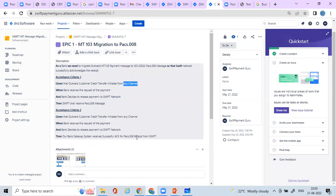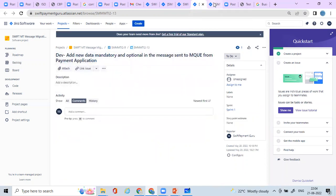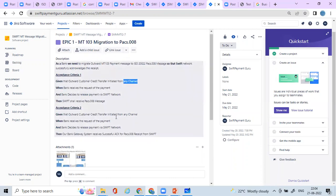They can add multiple acceptance criteria. Now, based on the acceptance criteria and the description, as a business analyst you should be able to write down the user stories. You cannot develop one entire epic at once because it would take a lot of time and effort, so you divide it into multiple user stories using story splitting - whether you do horizontal slicing or vertical slicing, depending on your project - but basically you will do vertical slicing, where you test all layers with a small part from each layer.